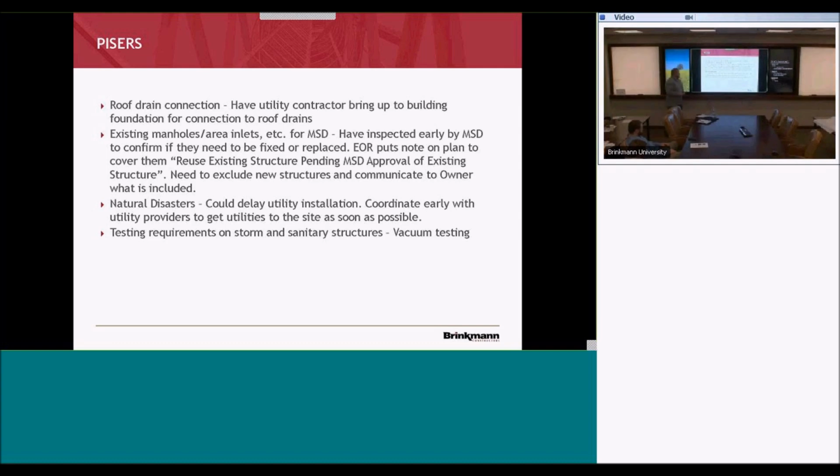Be careful excluding this, though, Jake. If I were you, I'd either get an alternate, see how much it is for the sewer guy, plug it into your bid, just carry the cost. And then if you have to replace it, you write him a change order later, or if it's a real big scope, make an allowance and talk to your owner about it. You just don't want to get into arguing over a change order. It's easier to put the money up front in the deal than try to get a change order in later.